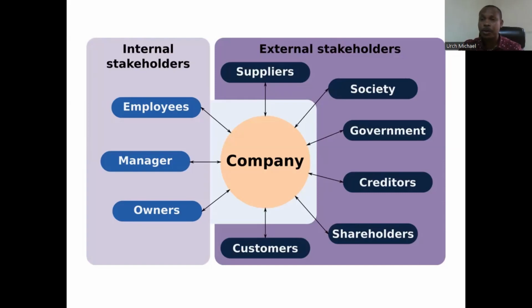They want to know if you're building according to the approved master plan. The project is in line with the master plan. They want to know if you've actually obtained the necessary development permission documents. You've got everything ready for your project. So they are stakeholders. If these things are not in place, they want to know if you're building on facility lines, utility lines and all that. Okay, so you have to consider them as well.